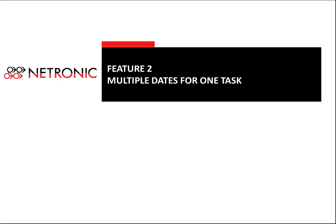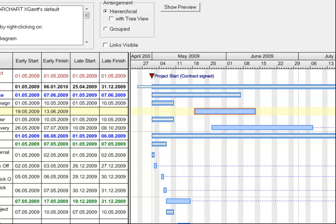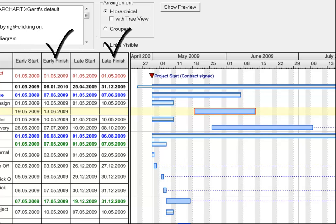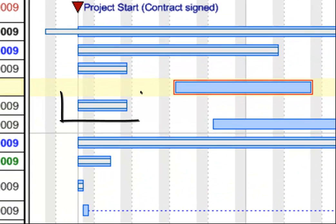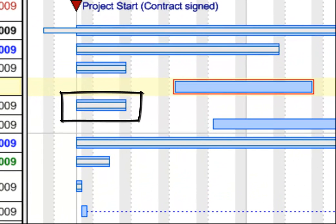Many planning applications, like project planning or production planning, work with multiple dates for one task. A commonly used approach is to plan both the earliest start date as well as the latest start date and likewise with the finish dates. All these dates should be shown for each activity in the Gantt chart, as you can see here with the grey and blue colored nodes.